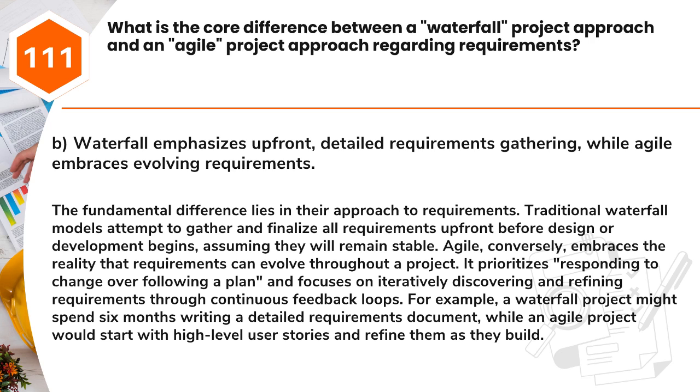Agile, conversely, embraces the reality that requirements can evolve throughout a project. It prioritizes responding to change over following a plan, and focuses on iteratively discovering and refining requirements through continuous feedback loops. For example, a waterfall project might spend 6 months writing a detailed requirements document, while an agile project would start with high-level user stories and refine them as they build.